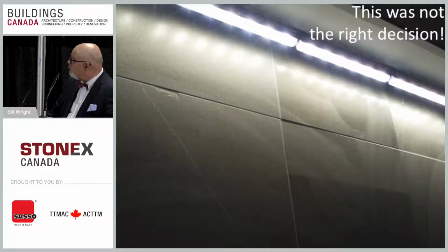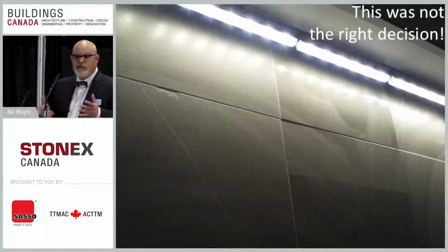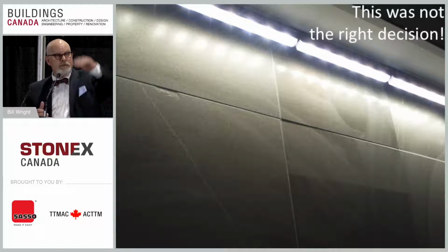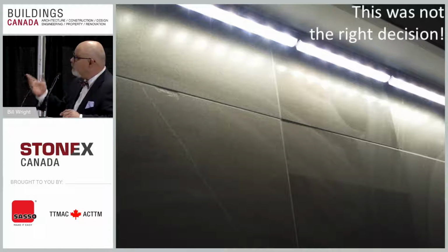Okay. Again, this was probably one of the worst jobs I went to. This was a job up at York University. Some of the tiles were broken on site. So rather than talk to the general contractor, to the client, York University, about maybe adjusting the pattern because it was supposed to be full pieces all the way up, the contractor went ahead and installed the material.